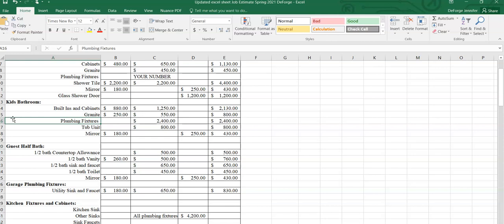Delta. Delta is one of those faucets that you could get for 90 bucks. It's not very fancy. It's chrome finish and whatever. So clients that are building $400,000, $500,000 houses are not going to want a Delta kitchen faucet for 90 bucks in their $500,000 house. They're going to choose something different that's going to cost more. And that's where a change order gets generated in contracts, because a change order is something that's above and beyond what you've allowed in the contract cost.